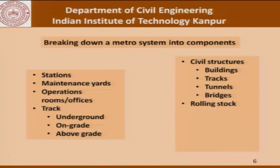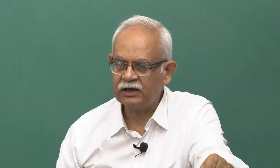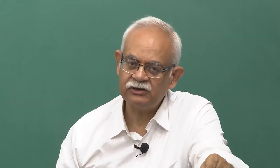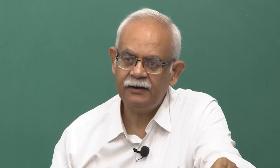Then there is rolling stock, which is definitely not a civil engineering story — it consists of coaches and the locomotives. Besides that, there are controls and monitoring systems, and the entire power network which has to be laid down. Depending on which way we break down a particular system, we will have a better understanding of what kind of expertise is required for executing a project. Execution does not necessarily mean only on-site operations — for rolling stock, the coaches and locomotives have to be procured, and for buildings or tunnels, we need to decide what kind of material to use, which is an engineering decision requiring proper planning and technical consideration.